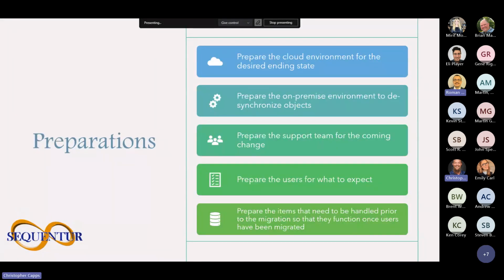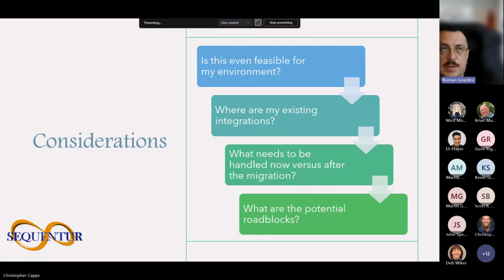So one of the things that customers typically ask us about, and don't really consider, is user onboarding. The onboarding process will change, obviously, because you have a new way of provisioning user accounts, a new way of setting up security, a new way of deploying new computers through Intune or Autopilot. All these things are best taken care of ahead of time with testing, because this is honestly not a very easy lift. It's a big systemic change despite the apparent ease of how it should be done.